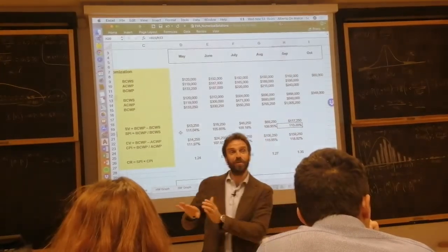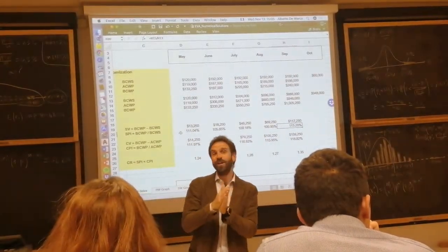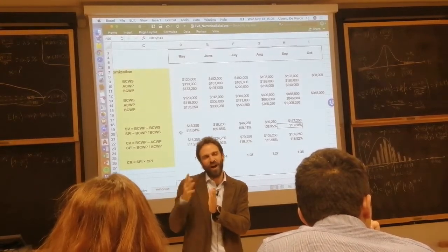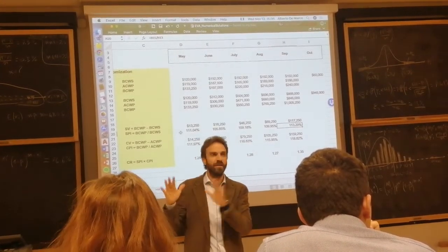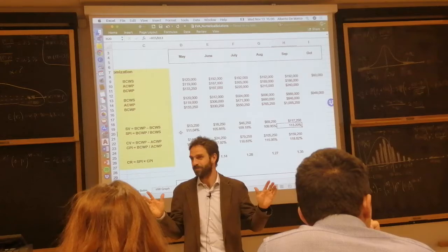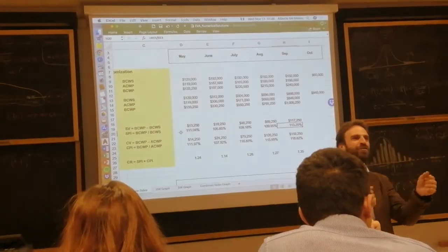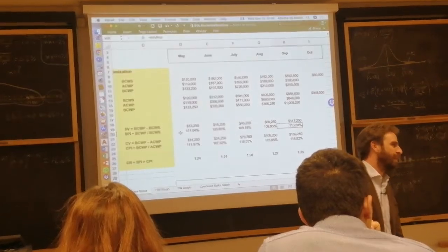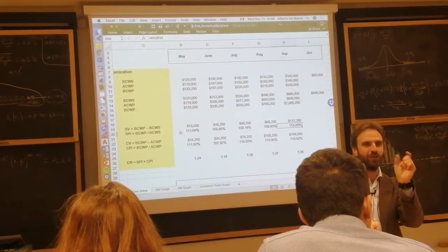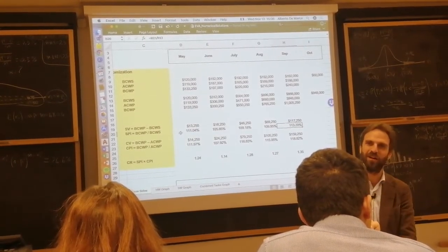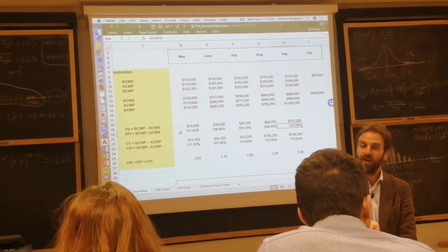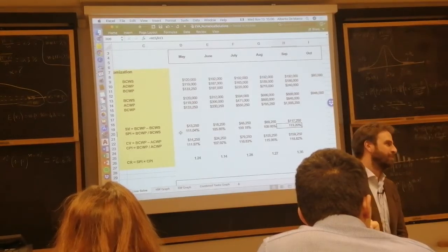Whatever decision you take when the project is more than 50 or 60% complete is too late. So there's an effective time window for you to steer or drive the project. It's from 20 to 60% of project execution, approximately. Keep that in mind as a project manager.